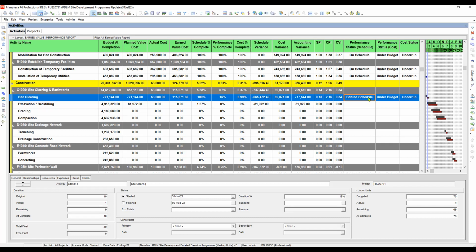Okay. Now, referring to the schedule and cost performance, referring again here, since the performance status, which is behind schedule, is not the cause of the contractor, we must not include this in the ETC or the estimate to complete technique to influence the projection, because it will worsen the result, which is not true to be the burden of the contractor, right? So we must ignore this in our technique options or selection. So meaning the SPI is not included anymore.